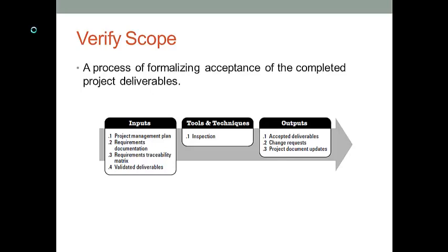You want to compare the work breakdown structure you built to the requirement analysis you did before, and make sure you have assigned the required resources and activities to the project, so that your project team is able to accomplish what the customers want. You can use a variety of methods to perform scope verification. You can use your own judgment, or form or invite a panel of experts to help you estimate if you have assigned the required resources and activities.